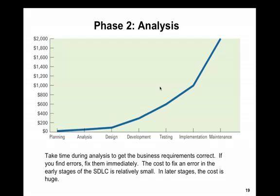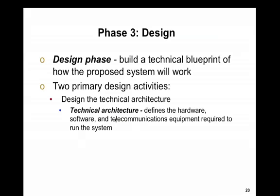What we're looking at is the dollar value — it takes time during analysis to get the business requirements correct. If you find errors, you can fix them immediately in the analysis stage. The cost to fix an error in earlier stages is very small; in later stages, it's huge. This graph shows that if you find an error in implementation or maintenance, it costs more money to fix. People take shortcuts in planning and analysis, thinking 'how much analysis do we really need to do?' and start right at the design phase — which is the starting point of all the failures.